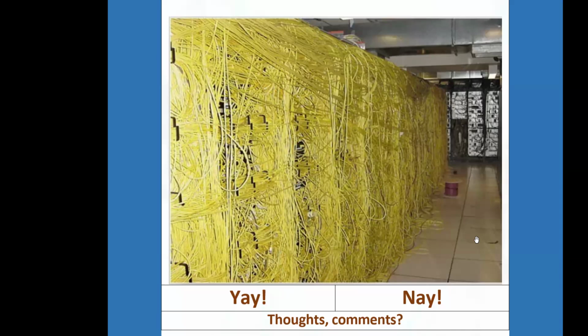Yeah, and sometimes if you think you can do it, after you being a little bit experienced, you can offer a cleanup to the client, or you can just say, "Look, we can't do anything until this whole mess is cleaned up. We will offer to clean it up for you before we start the job, and it's going to cost you so much to make things right." And sometimes the client says yes, sometimes the client says no. Then you deal with it, depending on what you decide to do.